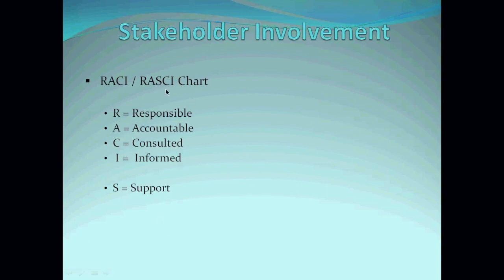So the business analyst will be responsible for the business requirement document. The business analyst will be responsible for gathering the requirements. Even if the business analyst is the one responsible, the project manager is accountable for it, because the project manager needs to ensure you are gathering your requirements. So overall, the project manager is accountable for requirement gathering, or for producing the business requirement documents, because it is the BA that is responsible, but the project manager is actually accountable for that documentation.